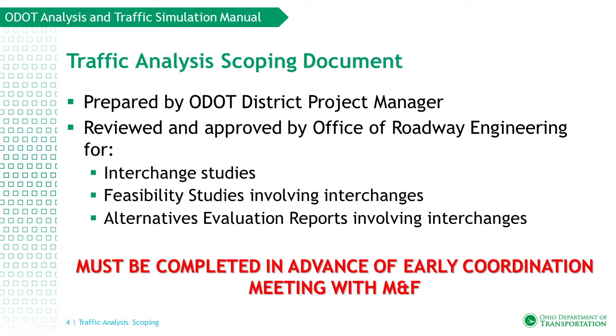The traffic analysis scoping document is prepared by the ODOT District Project Manager prior to the development of the consultant's fee proposal. It should be reviewed and approved by the Office of Roadway Engineering, also known as ORE, for projects that will involve ORE. These projects include interchange studies, which include interchange justification studies, interchange modification studies, or interchange operations studies, feasibility studies involving interchanges, and alternatives evaluation reports, or AERs, involving interchanges.